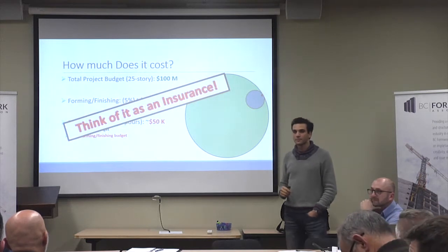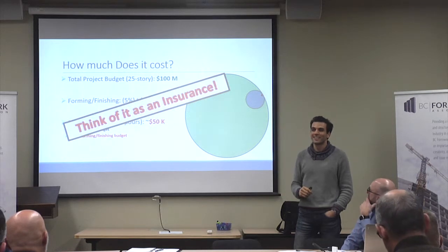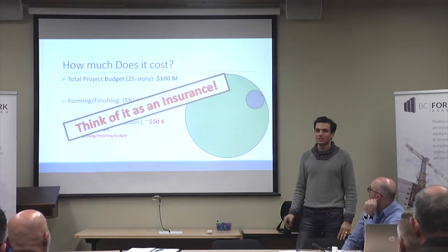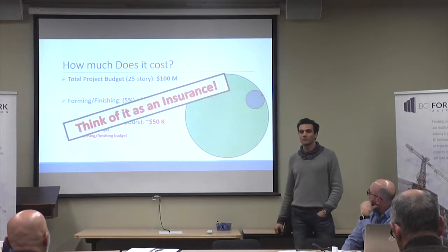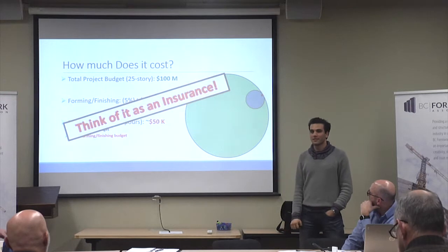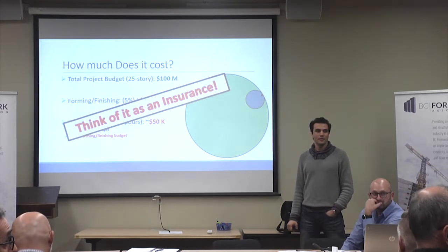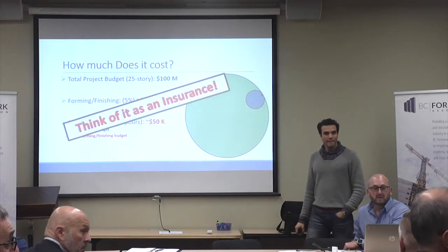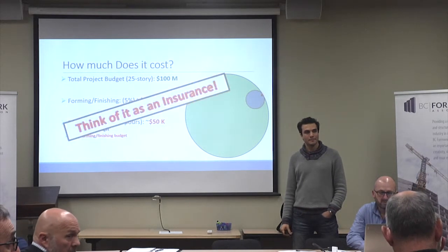Here's a question, how often do you fail something? Quite often. We fail whenever it's failing. Again, as I said, whenever we start a project, usually the first 5 pours are failing. Usually the beginnings almost always fail. We've done this, and the way we spun it, at that time it was a straight edge test. So they came out, they did the floor flatness, and for the finishes that we had, we're going to pay you so much for placing, we're going to pay you so much for finishing.